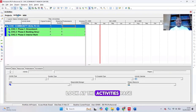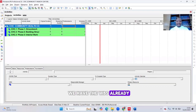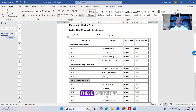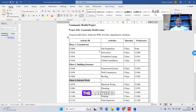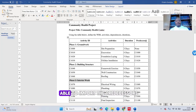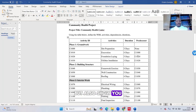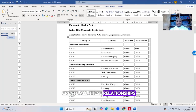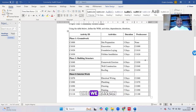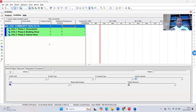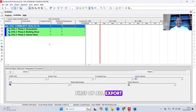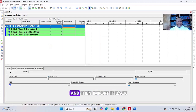Looking at the activities page, we can see the WBS is already there. The next stage is to load these activities. I don't want to type them one after the other — activities, activity ID, and durations. We might not be able to import the predecessors, but I'll show you a shortcut to create relationships at once, especially for serial relationships. First, we need to export a spreadsheet because Primavera can only import a spreadsheet of its own kind.